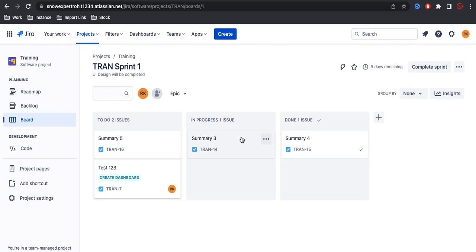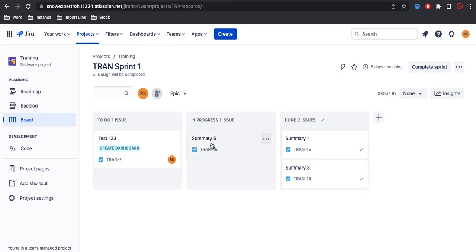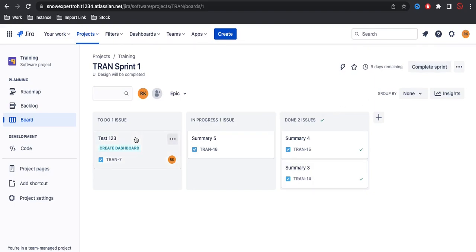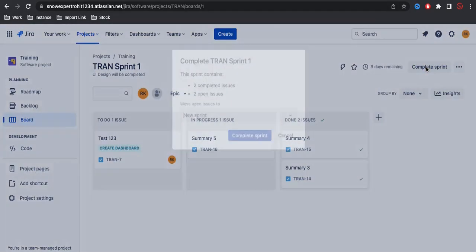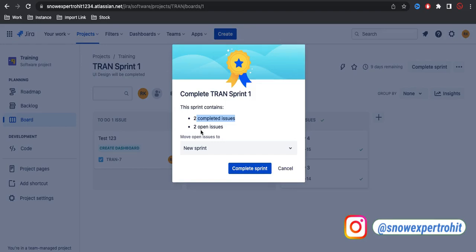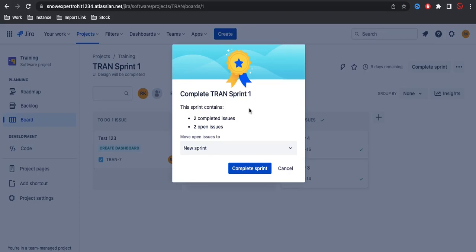Everyone will start working and after nine days the sprint needs to be completed. Let's say two stories are completed but one story is still in the to-do list and another is in progress. When the nine days are over, the scrum master will come and click 'Complete Sprint'. There will be a pop-up saying these two stories are still in progress - what do we want to do with them? The scrum master can choose to move those stories to a new sprint or back to the backlog.